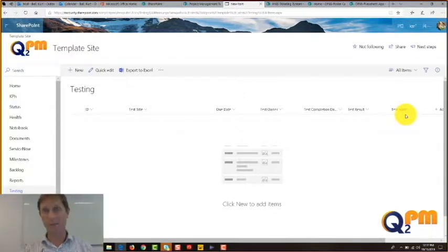Actually, I didn't quite say those names right. We'll see them in just a second. But what I typically do is I wait until we reach the point in a project that the developer and the database administrator have done enough work that we actually have something we're ready to test. And of course, we typically do our tests in UAT: our smoke test, UAT, and pilot. So you can break this out accordingly, but let's just make it real simple. Let's say we're going to come up with our smoke test, and that is some basic functionality to test that this thing is ready to show to our customer.